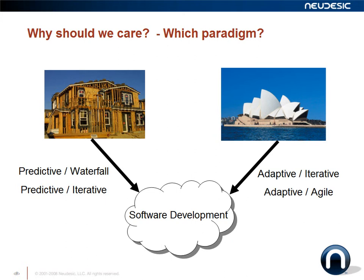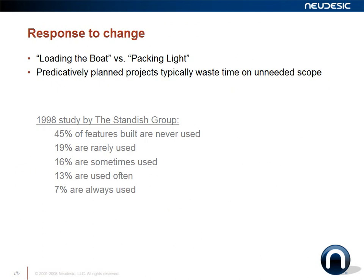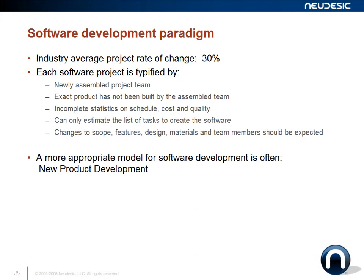Software development faces some of the same challenges. For a predictive waterfall model to work, you can usually absorb about 3% change in requirements or design over the course of a project — and within that variance, the methodology works extremely well. But we all know that in today's environment, change is much higher.